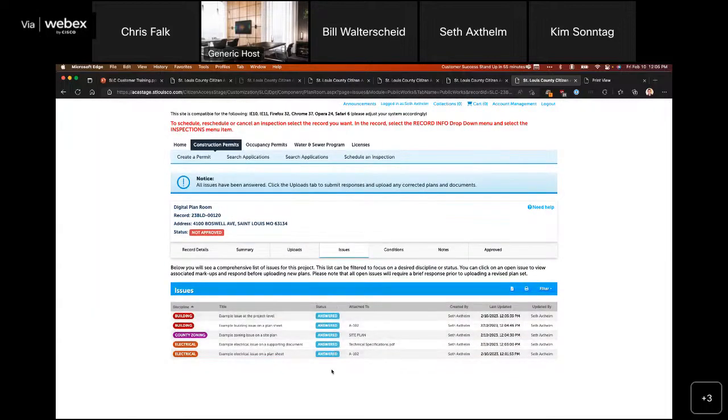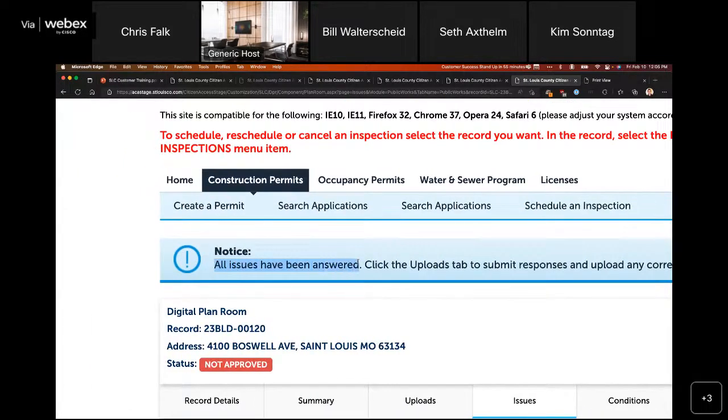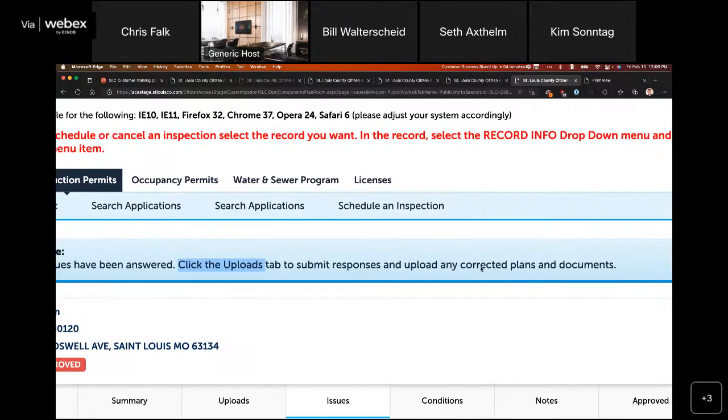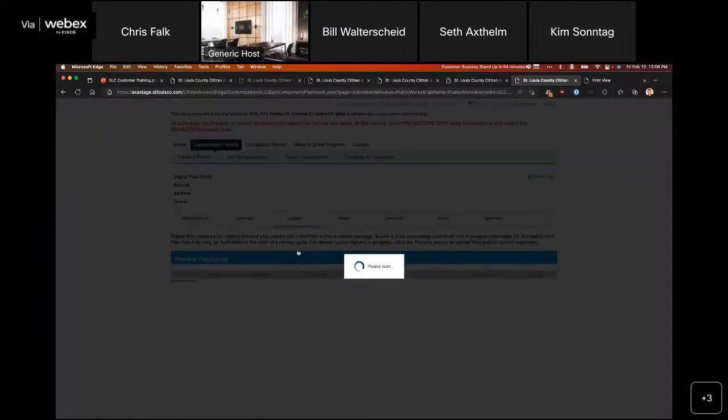And once I've done that, we'll see that all my issues are now answered. And I have this blue notice up at the top of the screen here that lets me know all issues have been answered. So once all issues have been answered, I still have one more step to do. I still have to complete my resubmittal. So it's telling me I need to click on the Uploads tab to fully submit both those responses, but also upload any files that need to be included in my resubmittal. So I'm going to come back down here and I'm going to go to my uploads.